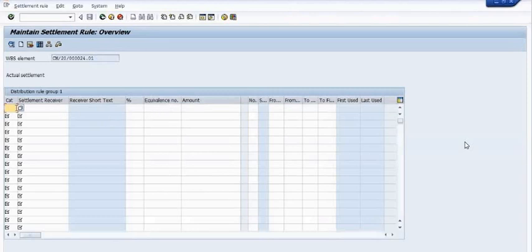So you can divide your WBS cost into the respective assets here. But in my case, we have only one line item, and we have already created one asset of the computer class to transfer the whole cost into that asset.